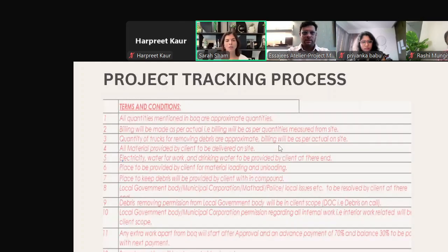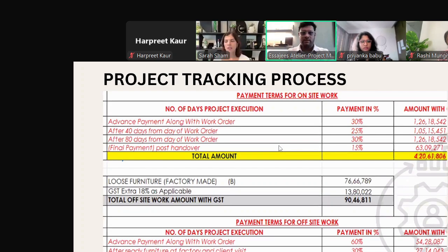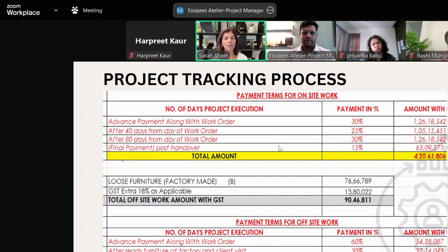So typically 20 to 30%, we go back. Yeah. Typically 20 to 30% is released. 30% is high, it's on the higher end of the spectrum. But like Amok said, when it's a fast track project, you end up paying a higher advance in the beginning. And you can see they've also then agreed to, instead of a 5% or a 10% retention, a 15% retention. So this is a very big negotiating